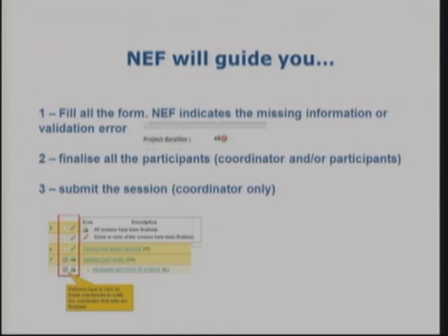In other, you can put receipts, declaration of interest, yield and pre-financing, and the certificate on the financial statements, if the requested amount is more than 325,000 euros. In signature, you will see the name of the person that is authorized to sign these financial statements. And in comment, you can put additional comments that you want to share with the project officer.